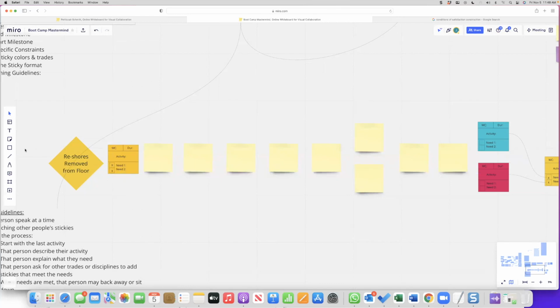Now, when you go forward and you do your forward pass, you're like, yep, this happens after this. Okay, yeah, this activity happens after this. Oh, wait a minute. This one can actually be concurrent, right? Then you can start to look at optimization and say, all right, some of these are concurrent. Yep, these go that way. Yep. These two, that's exactly right. We already knew that those two can run concurrent.